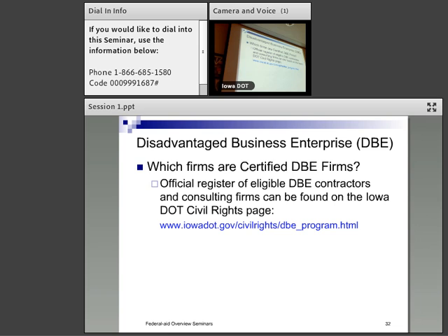This is one of the situations where they did the right thing, but they didn't do all the right things. And the right thing that they did is, number one, the DBE was being really honest. Hey, I wasn't there. I'm not entitled to this $900. The prime talked to the DBE, and they came up with a formal agreement. Those are the right things to do, but it's not all the right things. And the other thing that they should have done is, a 5-minute phone call would have done it.